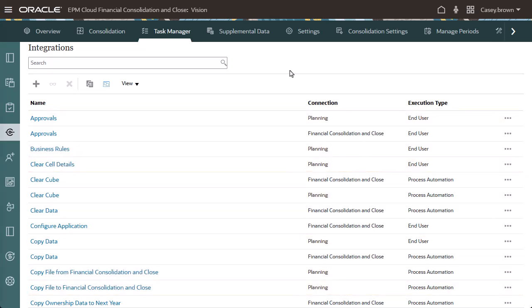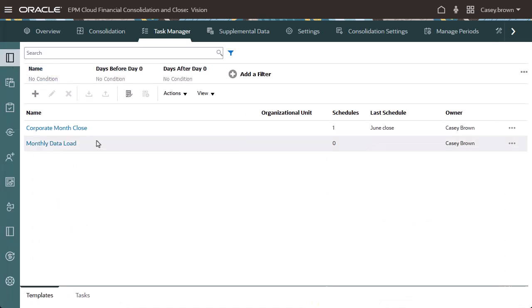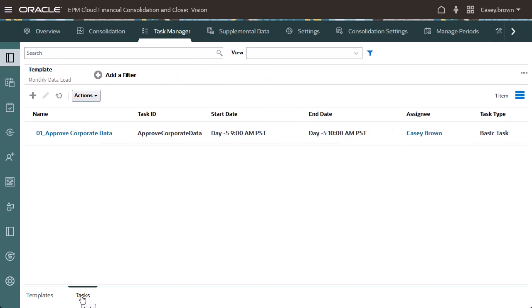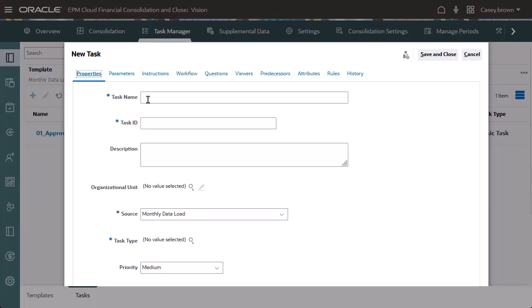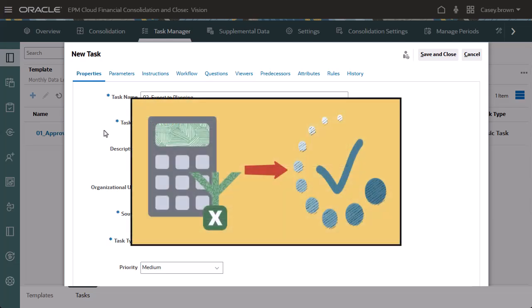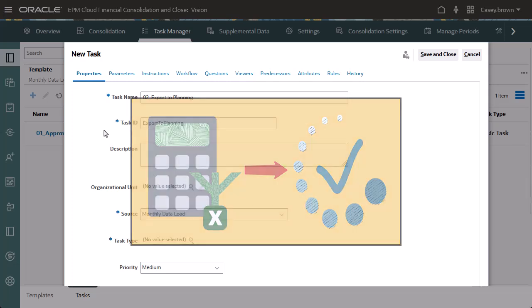Now I'll add tasks to a monthly data loads template that I've already created. My template already contains a task for approving corporate data that starts on day minus 5. I'll create an automated integration task that runs a data load rule when the approved corporate data task is complete. The rule copies the approved data from the Financial Consolidation and Close business process to the planning business process.